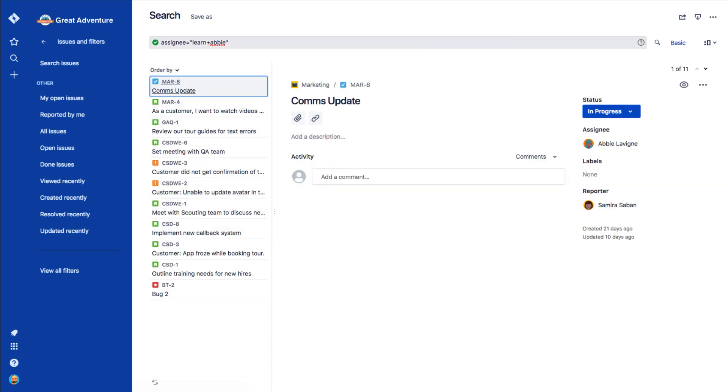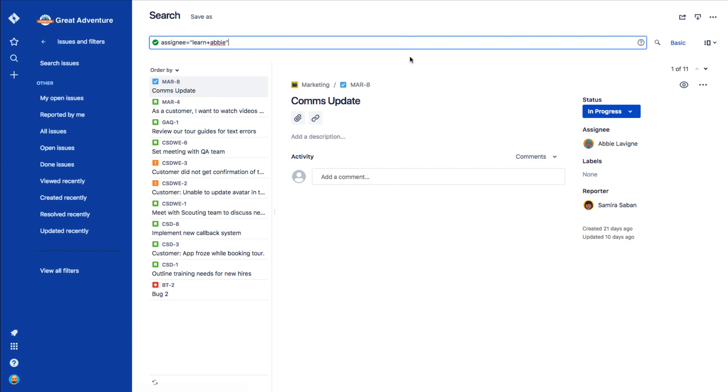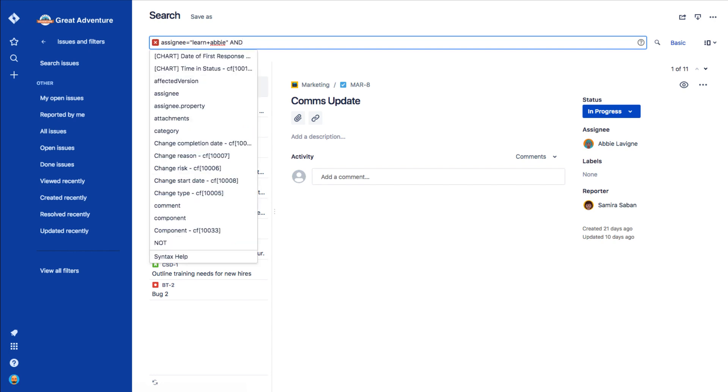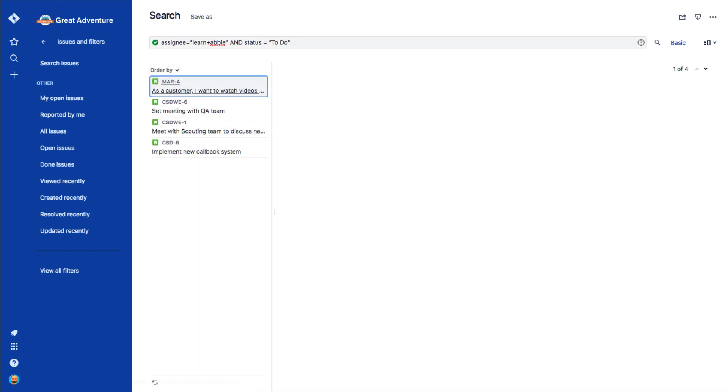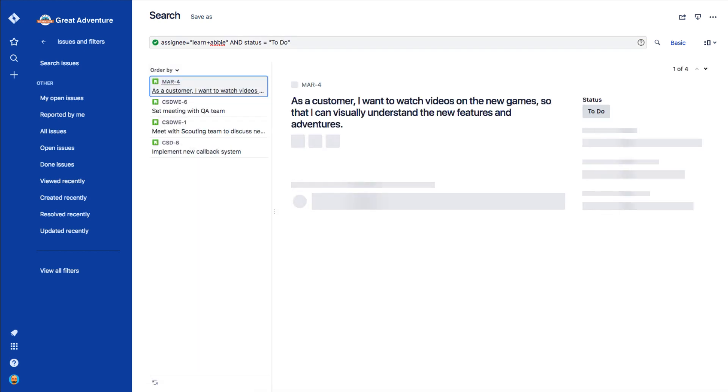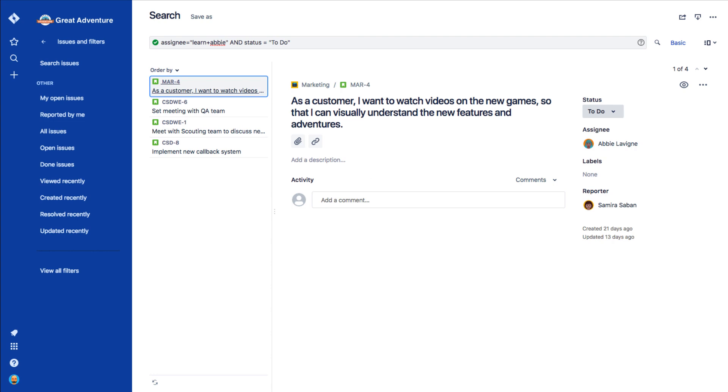Press Enter to see your results. And you'll see all the issues assigned to Abby in the entire Jira instance, which actually might be a little bit too much. Let's try another bit of JQL to narrow down to a certain status. In the Advanced field, we add AND status equals TODO and press Enter. And now we just see a few issues assigned to Abby in the TODO status.